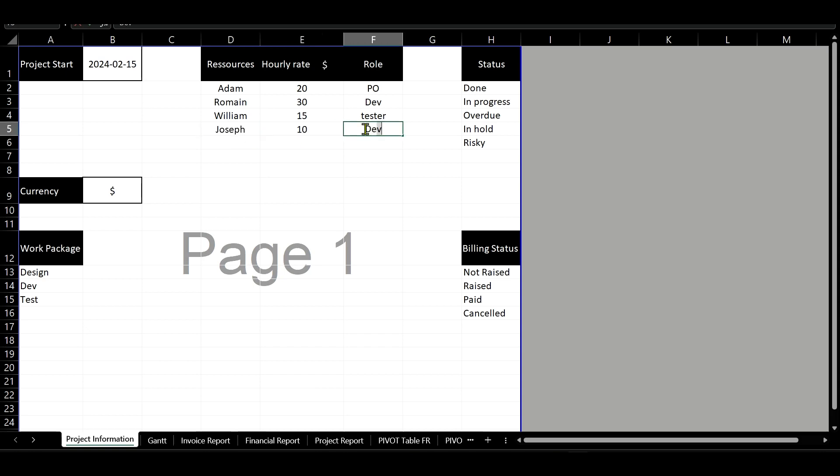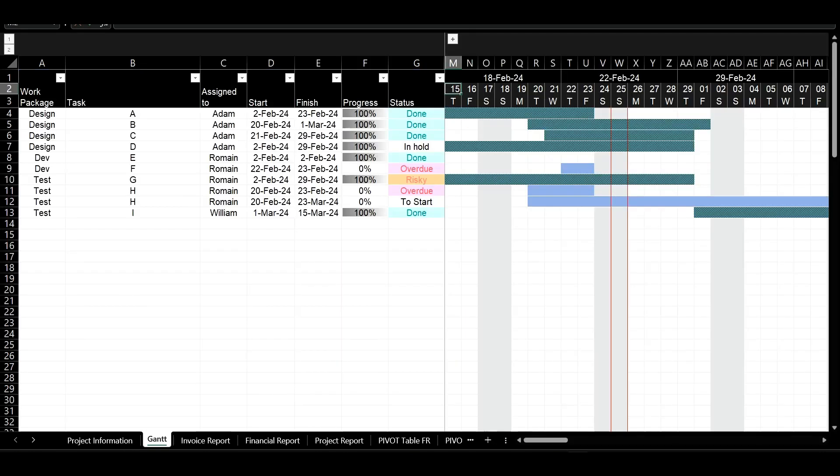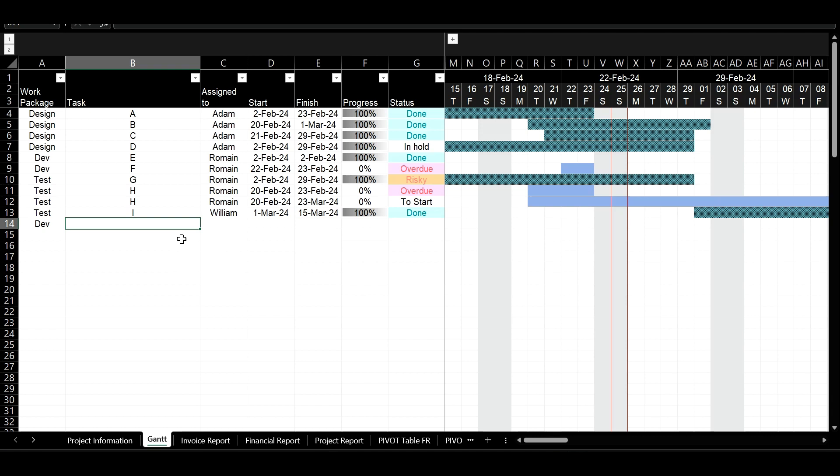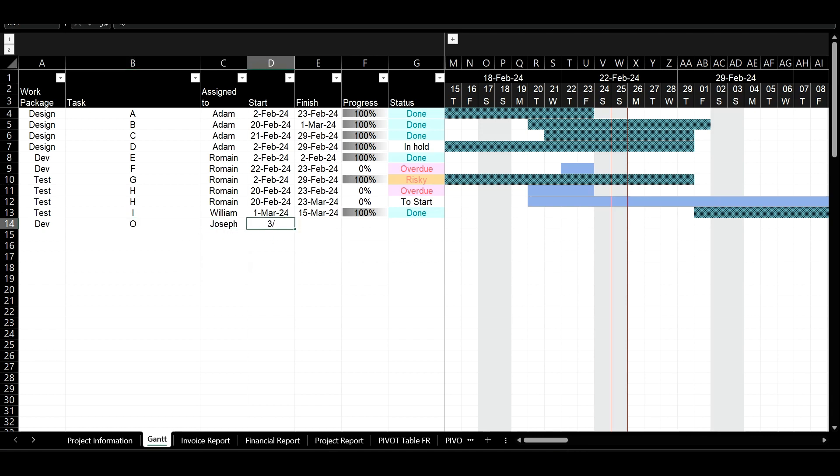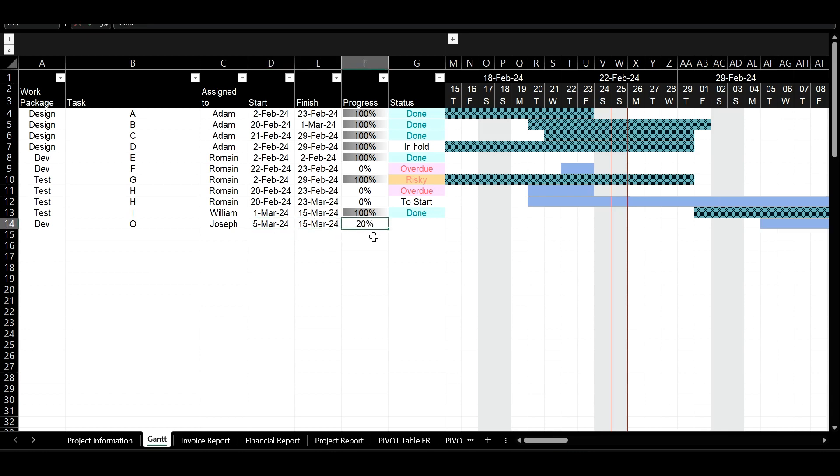Next, I proceed to input project tasks utilizing the to-do list and strategically plan these tasks with the support of the Gantt chart. This involves allocating resources and estimating the hours required.